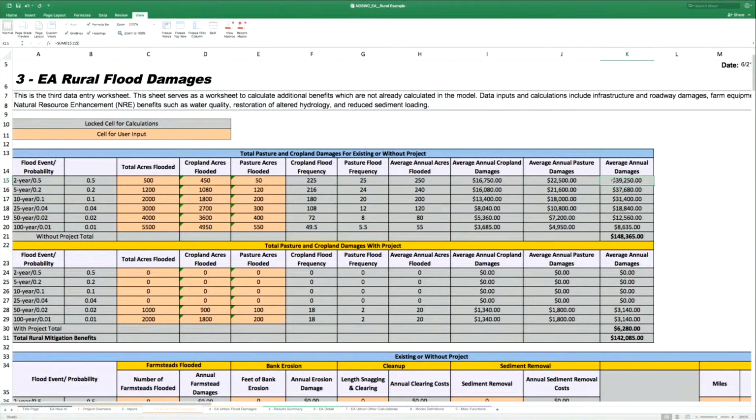So that's the reason why you're providing each of these values. And as Jay mentioned, one of the things that's interesting with this type of analysis is if you have a lot of flooding at, say, the 2 through 25 year rainfall event, and your project is targeted to 25-year protection, you can get a lot more benefit than you can with a 500-year project.